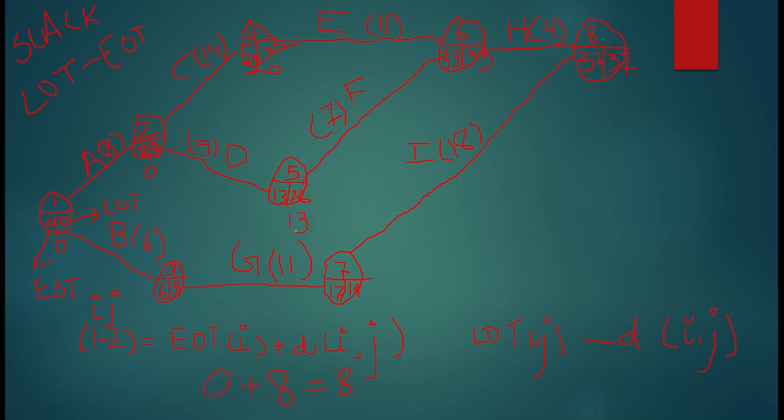So basically slack is how much extra time I have to complete an activity. So here I have 13 extra time, whatever 13 weeks or hours, whatever is given to you. 8 minus 6 is 2, slack is 2, 19 minus 17 is 2, 33 minus 33 is 0, and 37 minus 37 is 0. So here you can see that there are three activities or events, we can say 5, 3 and 7. Here we have a slack of certain numbers, but there are other activities like 1 to 2, 4, 6, 8. These activities have slack 0.